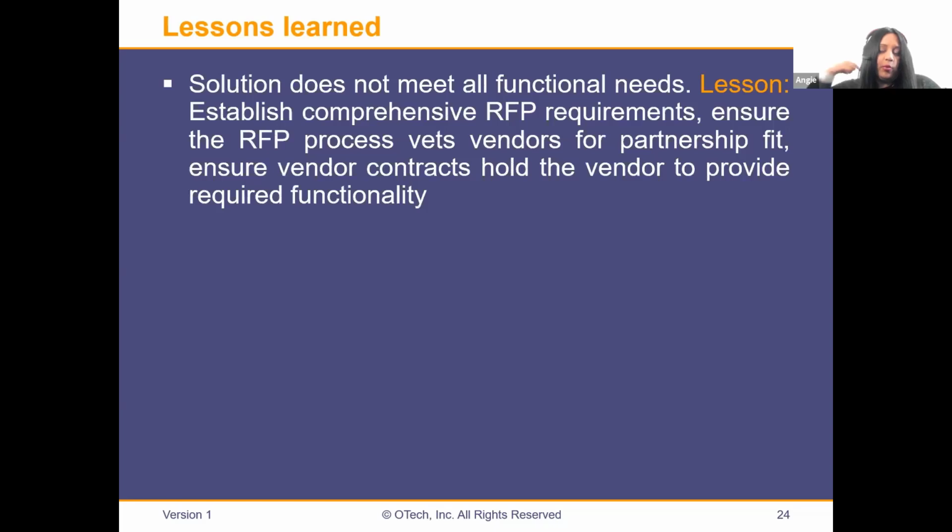So at the end, the project did go live with 3 hospitals using cross-site peer review and 1 hospital using intra-site peer review. Not exactly the uptake that was originally planned for the shared service. The first lesson learned, looking at the solution itself, is that it didn't meet all of the needs. An example is anonymizing the original radiologist in the report text. This was met only if the hospital or shared service itself stripped that information from the HL7 message before forwarding to the peer review solution.